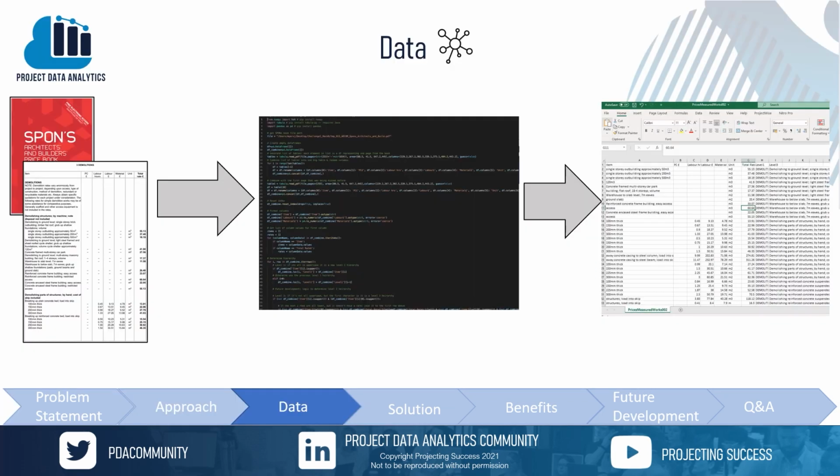We focused on extracting the prices for measured work section of the book, which spans 400 pages. Using the tabula module within Python, we extracted the tables from the PDF into data frames. A verification was run to ensure all pages had been extracted. We then had to implement some cleaning steps, with the export splitting items into separate rows if the string was too long, and we also corrected the hierarchy categorization. The final data frame was then exported to CSV.